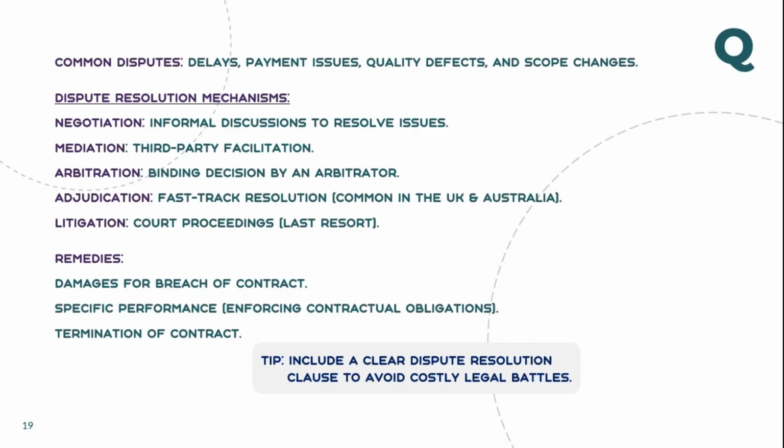So after the safeguard provisions, you have to look into dispute resolution mechanisms. Just check what the resolution mechanism in the contract is. Is it arbitration? Is it litigation? You need to think that if litigation is the mechanism, that is adverse; you go into court and there is no comeback after you go to court. Is that making sense to you? Because a good client or a good contractor, guys, don't think the client always has the upper hand. The client respects the contractor also, because if he is a good contractor and you as a client treat the contractor in a good way, you also get benefit from him. He will treat you in the best way also.